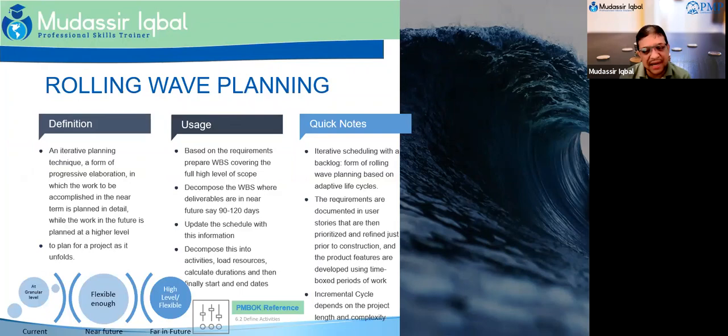Once we take that activity, that user story, that task, then we only plan. The idea is that work can exist at various levels of detail depending on where you are: the work package, the control package, and the planning package. You know every single item of excavation. You might have an idea how the foundations are going to look, but who cares about the interior and the final structure at this point in time?